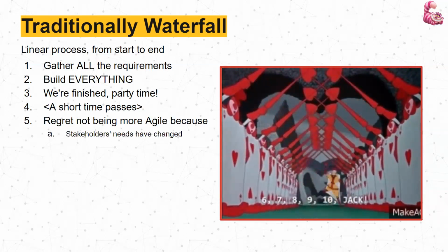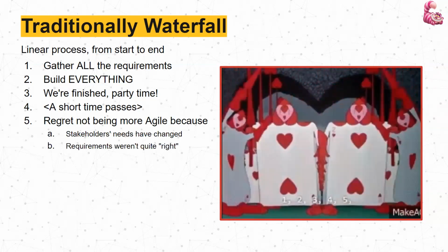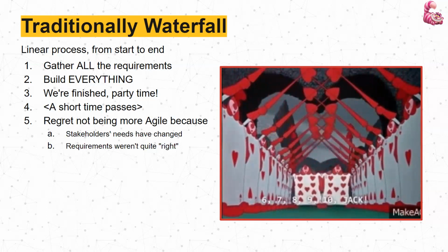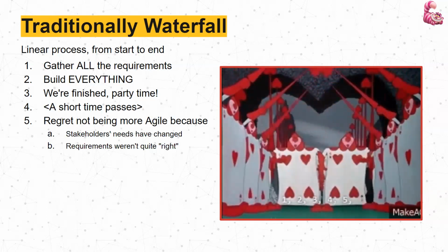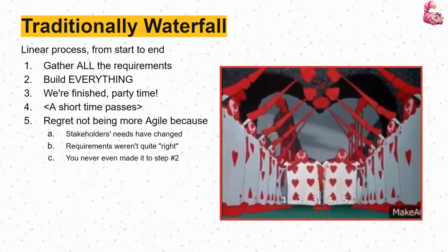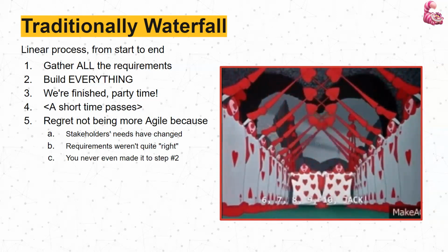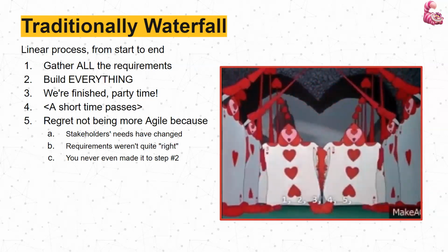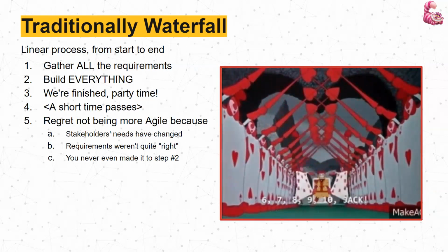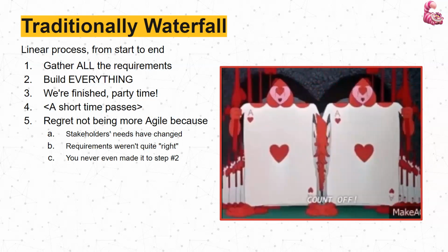Because what happens? Sometimes stakeholders' needs have changed by the time you get there, right? Requirements maybe weren't quite right for whatever reason, right? Sometimes it's not right. Sometimes you never even make it to step 2, right? You get so stuck in gathering those requirements, things start changing, nothing ever gets built. There's a little bit of regret with that.